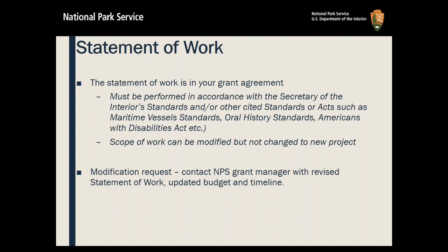We can modify your scope of work, but we can't change it, because remember that your application was submitted and judged, and you were awarded a grant based on that statement of work and the type of project that you were proposing. So a modification request can be made if you need to make some minor adjustments, but again, contact your grant manager and we can talk through the revisions that you're looking to make.